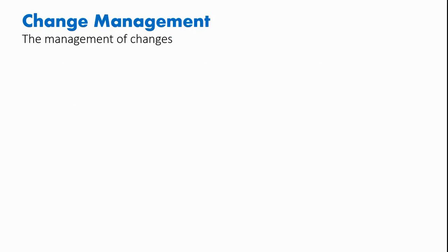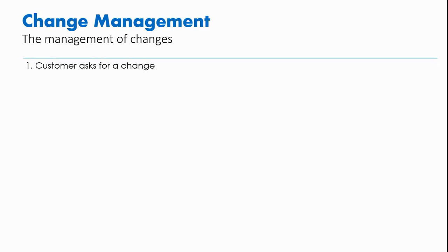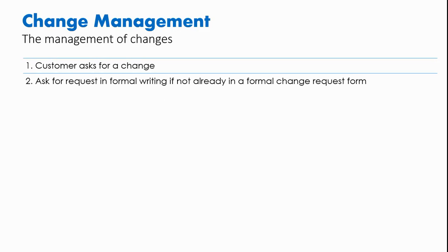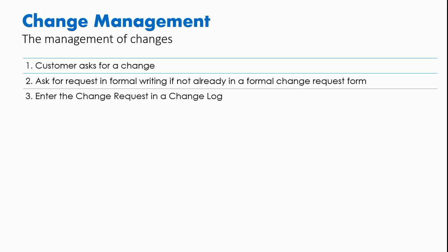So there's a difference between managing specs versus managing changes. Managing specs has to do with managing changes to specs, but the management of changes in the world of the PMI are things like this. One, the customer asks for change. Two, ask for the change in formal writing. Three, put the change into a change log.